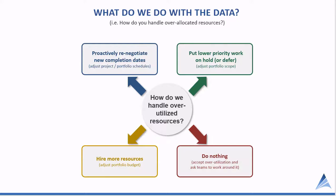One quick plug for work intake: if you've got a good work intake process, you will protect your resource capacity. One of the goals of intake is to ensure that you do not overload your portfolio. You want to let projects into the portfolio that can be resourced. One of the worst things that can happen — and it happens all the time — is to approve far more work than your teams have the ability to execute against. Then you get into trouble with missing deadlines and needing to renegotiate scope or finish dates. It's really better to protect capacity up front with a strong work intake process.